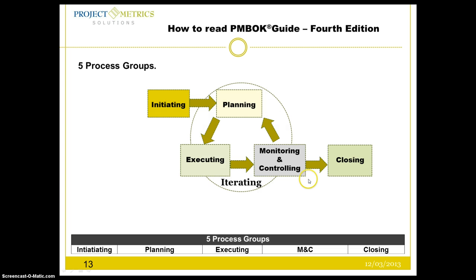It is not rigid, it's not a straight line. It is iterative. Sometimes you go from planning back to initiating one more time to be sure what's going on in the initiating phase. Sometimes you go from planning to executing, from executing to monitoring and controlling. Then you have to go back to planning again. Or sometimes you go from monitoring and controlling back to executing when you implement all that's planned.